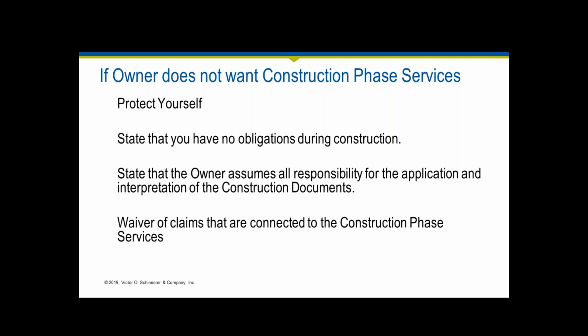You can say clearly that you have no obligations during the construction phase. You want a clear statement that the owner assumes all responsibility for the application and interpretation of the construction documents. This is something that the owner is going to have to resolve on their own.